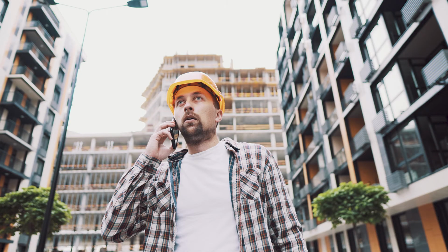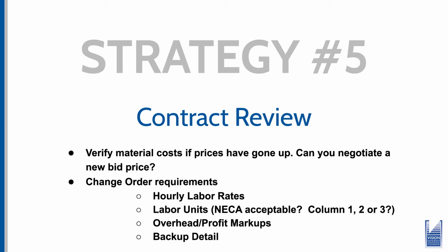One of the things you need to do is talk to your suppliers, and see how long they're going to hold the prices, if you're using their prices on the bid. It is not unusual to be able to renegotiate a price or a bid after the fact, especially if it's been put on hold for an amount of time. EBM will let you update the prices. That's fine. But you have to look at your contract.